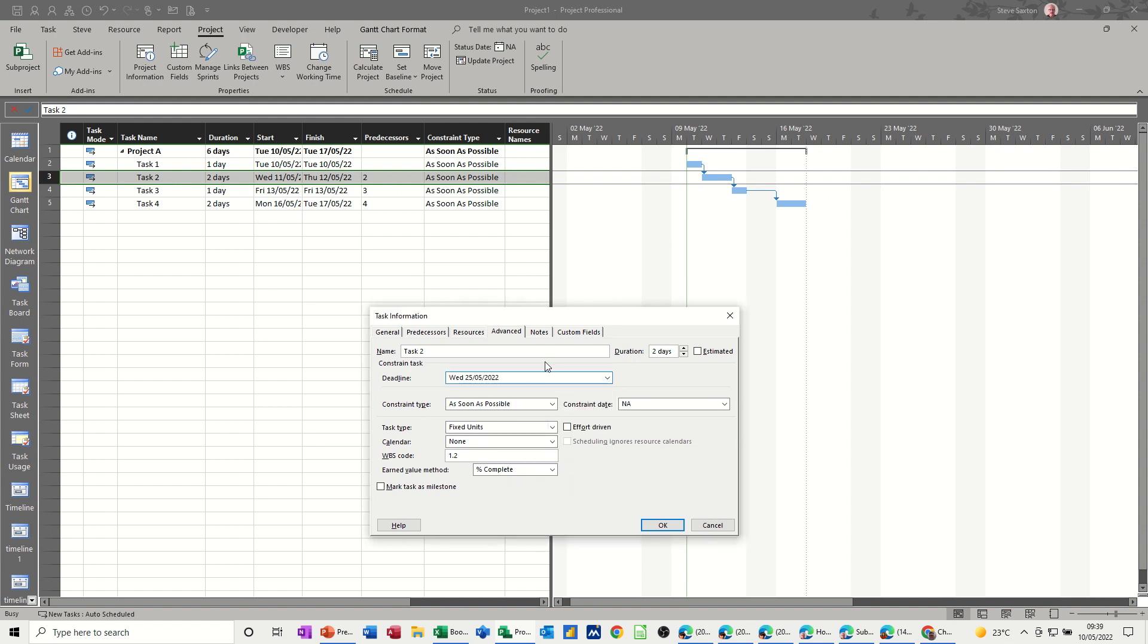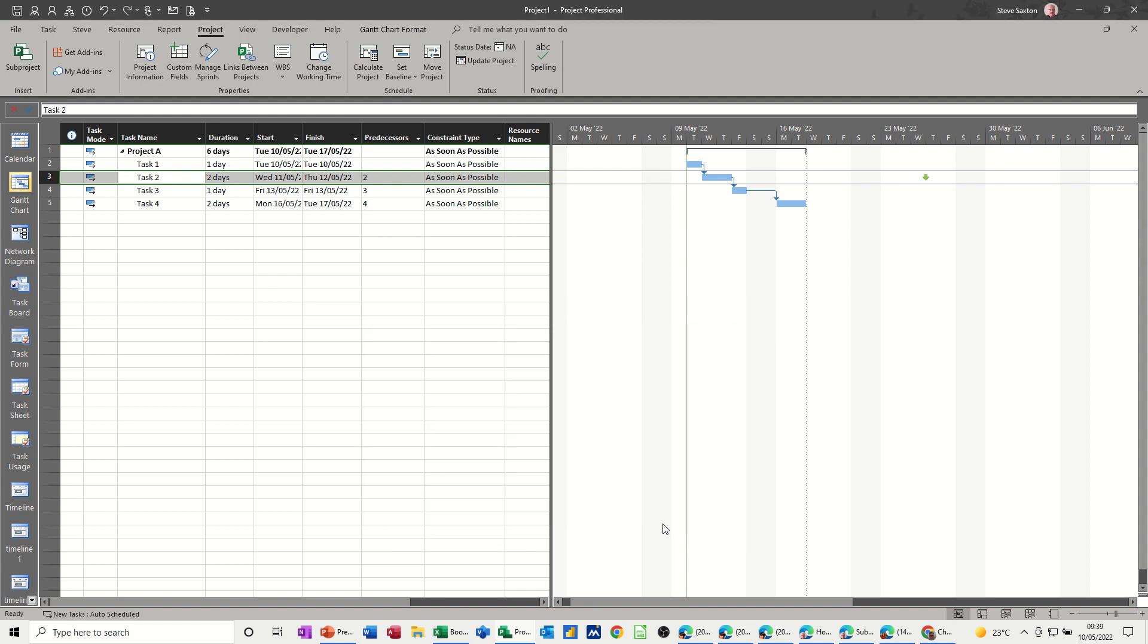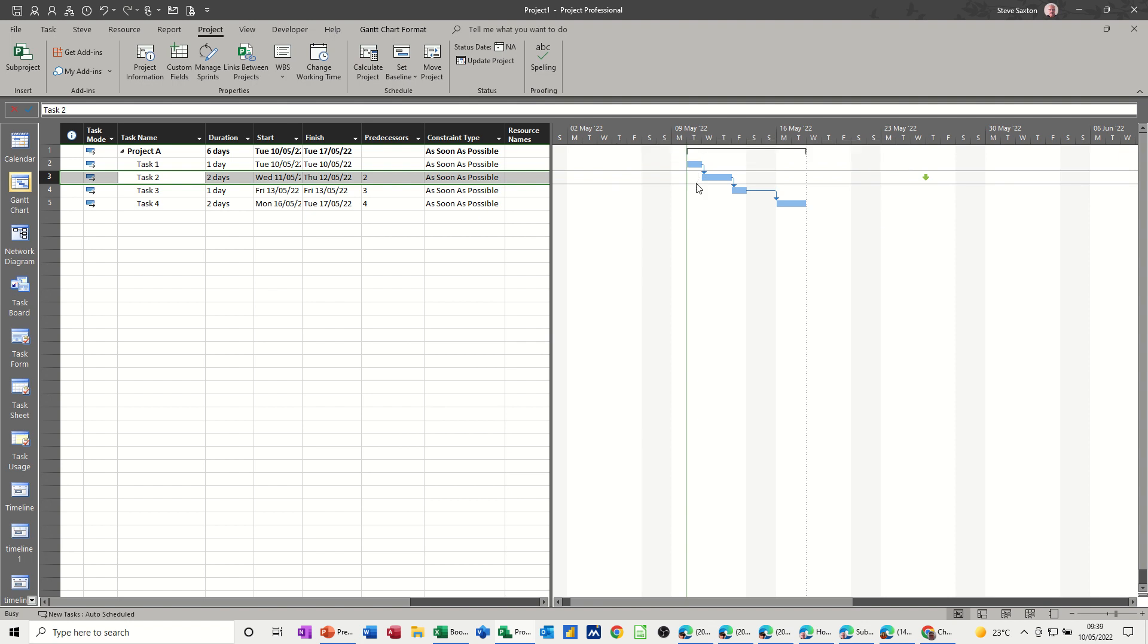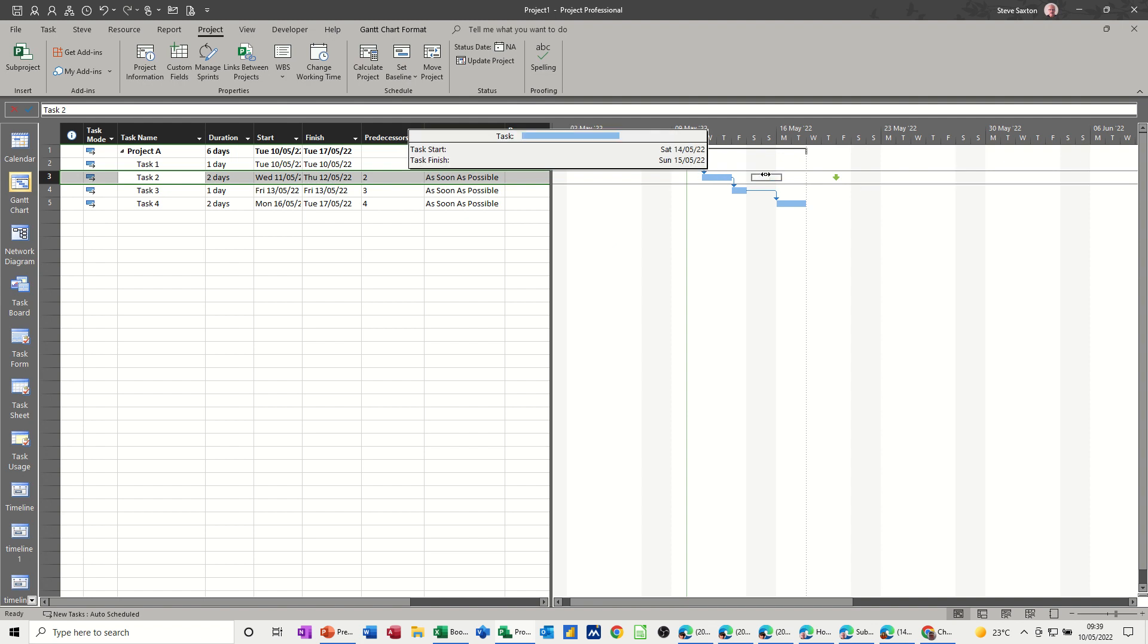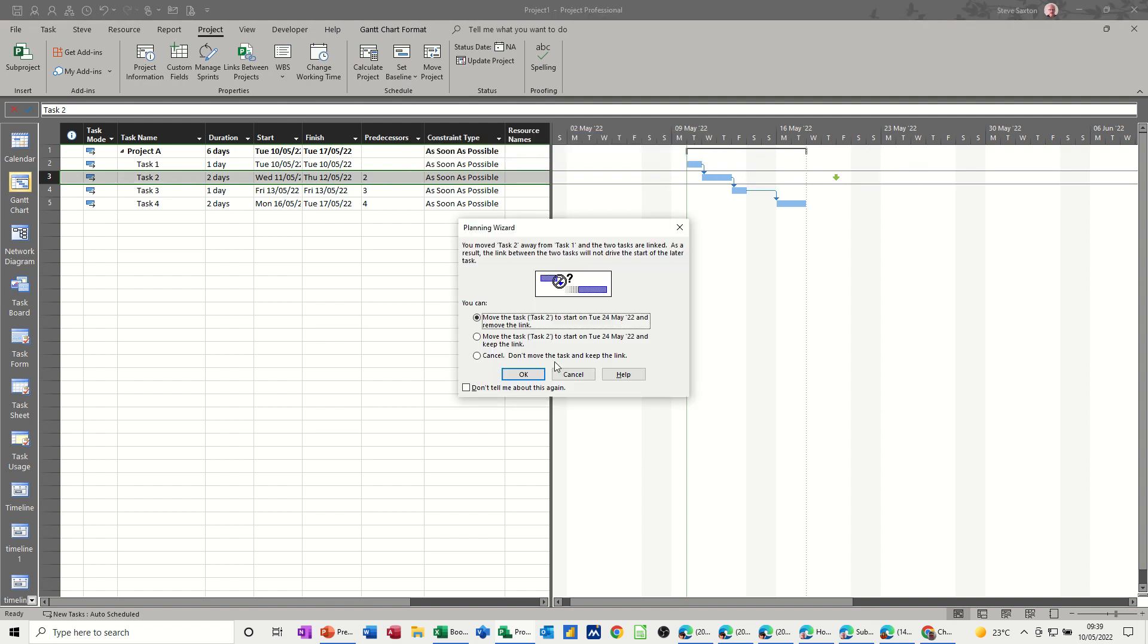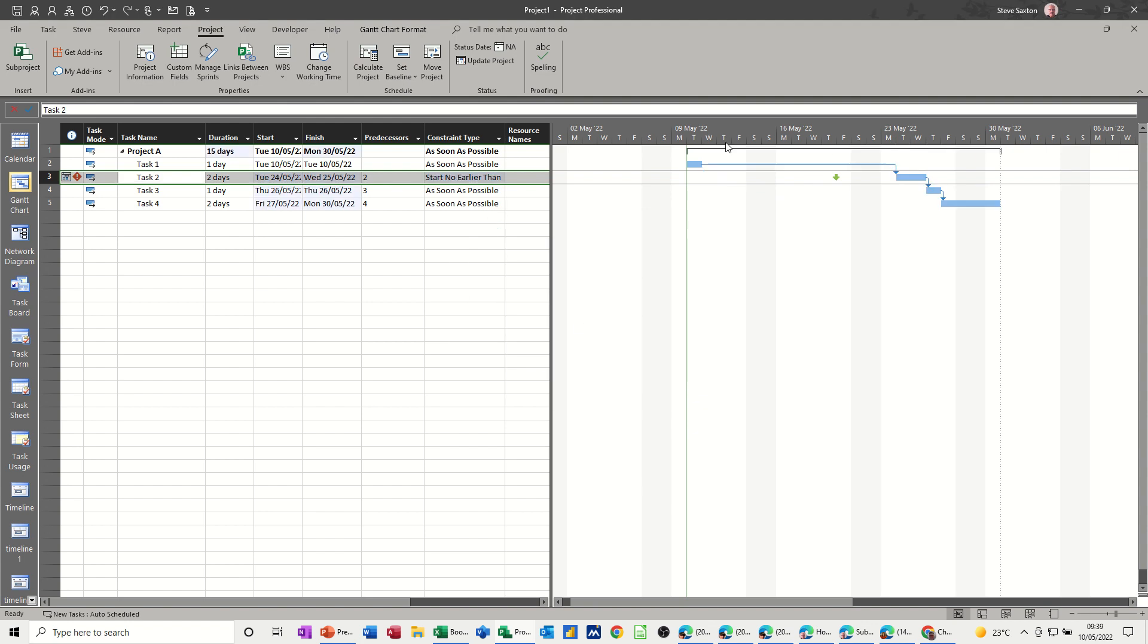So if I put 25th, which is in the future – click OK to that – you get that little indicator there. You can pick that up and move it. And if it goes past it, you get a warning in the information column that you've gone past the deadline marker. So that's all that is. It's not going to stop anything moving. I mean, I can move things past that – keep the link – it's gone past it and I've got the constraints. And I've got a constraint and I've gone past the deadline marker now. So I'll just undo that.